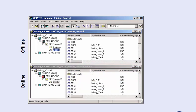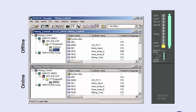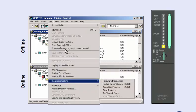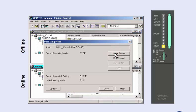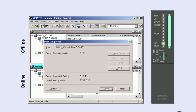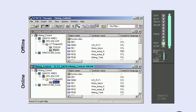To continue commissioning the software, please ensure that no dangerous machine or plant states can occur, and switch the CPU to run mode. Select the dialog for the operating mode via the target system menu, and start the CPU via mouse click. If the current operating mode changes to run, you can then start testing the functions. If the CPU remains in stop mode, the diagnostic buffer gives you specific information on the cause of the error.